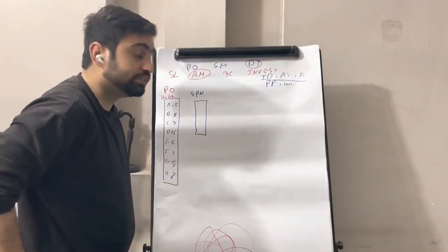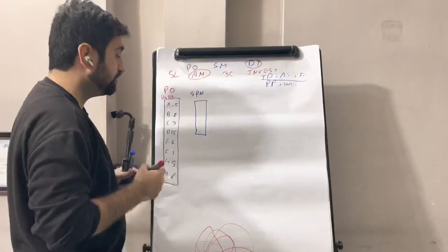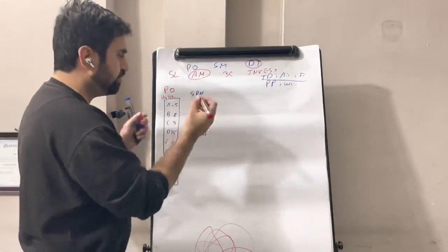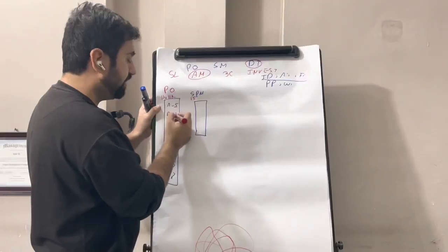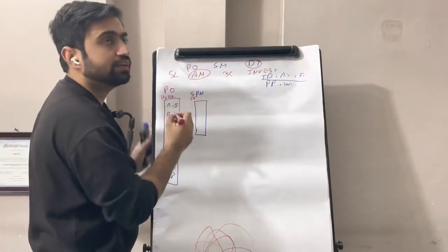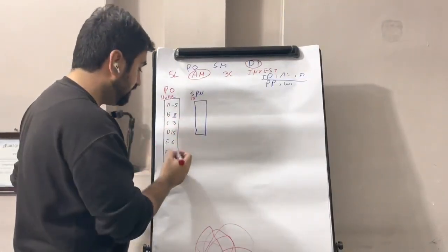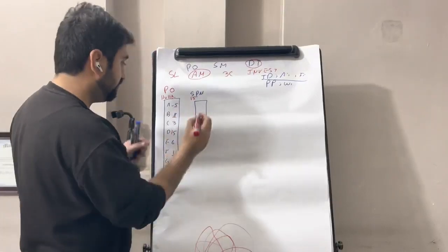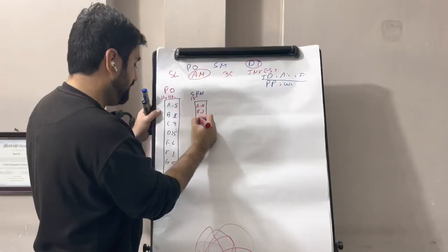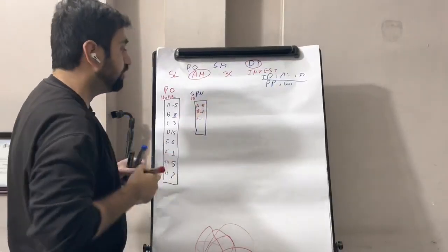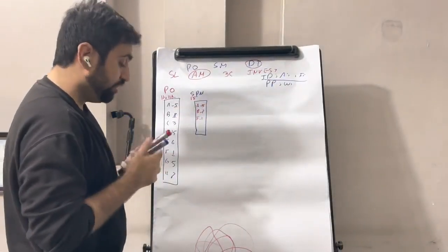So we say what our velocity is, and we provide the velocity accordingly. Let's say we put the velocity of the first sprint as 15. So this will come here: 5 plus 8, 13. And then we cannot take any more of them, so this will come here: A5, B8, F1. So we'll say okay, we'll complete this much work, and we communicate the sprint.